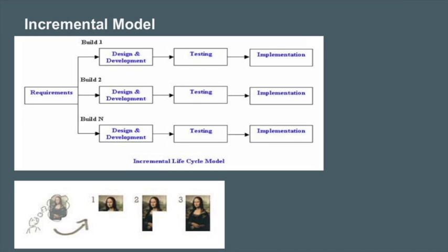The advantages of the incremental model: it generates working software quickly and early during the software lifecycle. This model is more flexible and less costly to change scope and requirements. It is easier to test and debug during a smaller iteration. In this model, the customer can respond to each build, and it lowers initial delivery cost. It is easier to manage risk because risky pieces are identified and handled during their iteration.